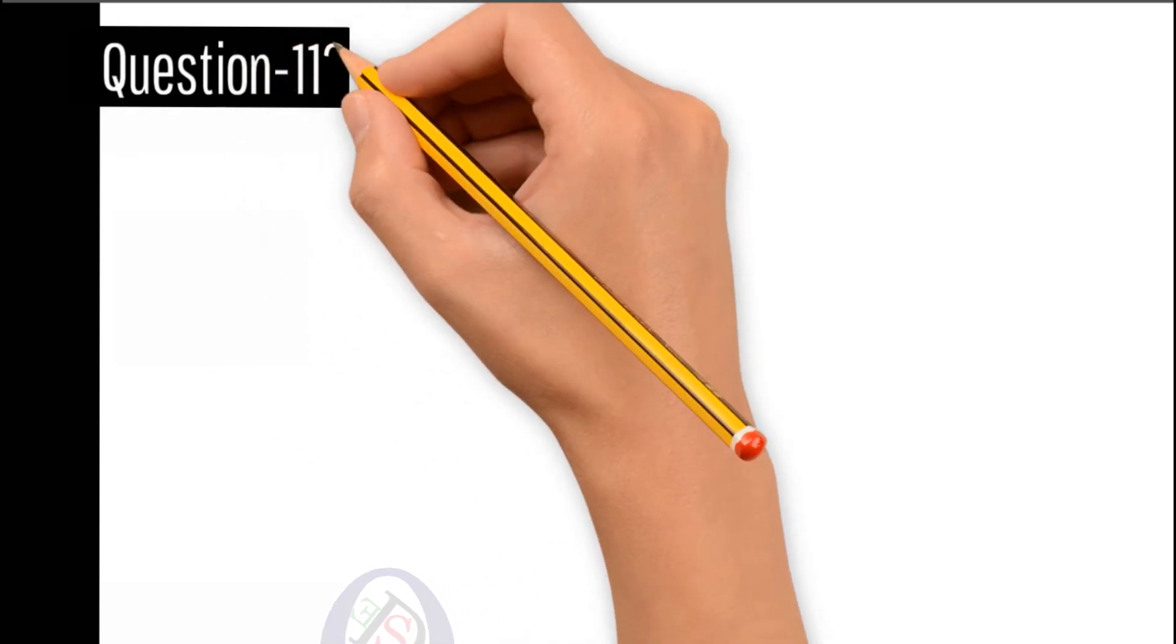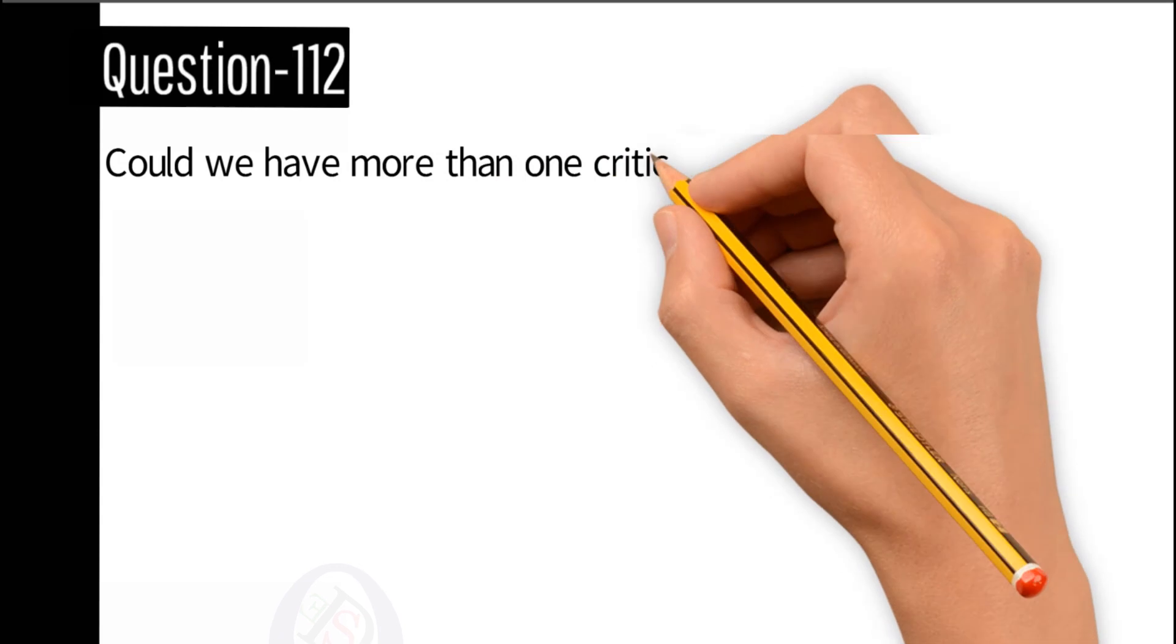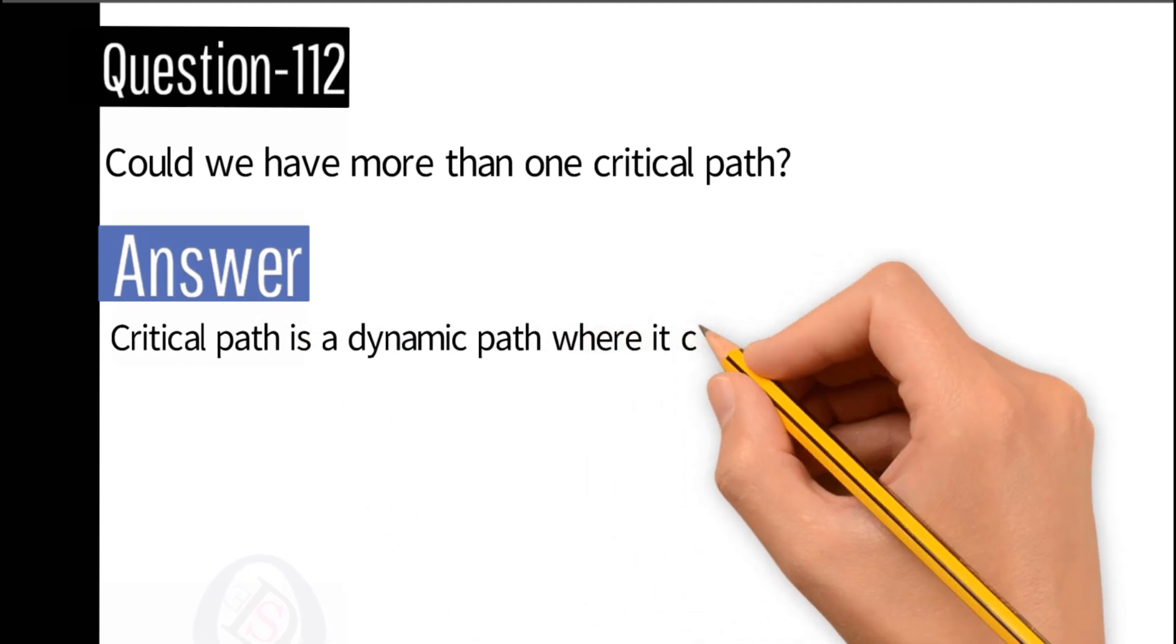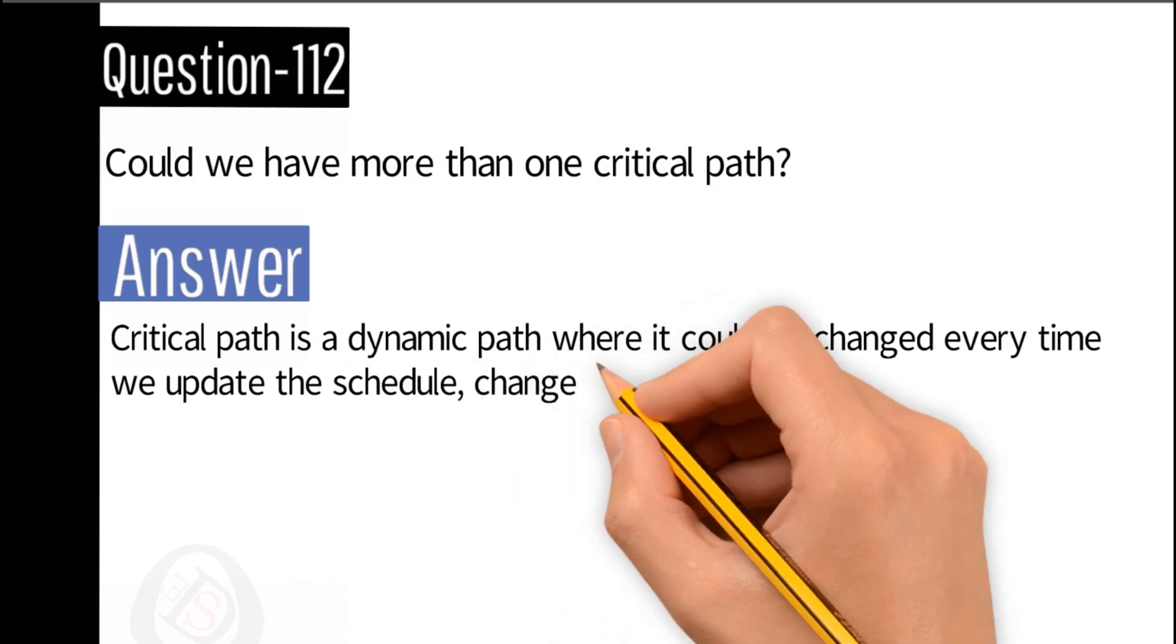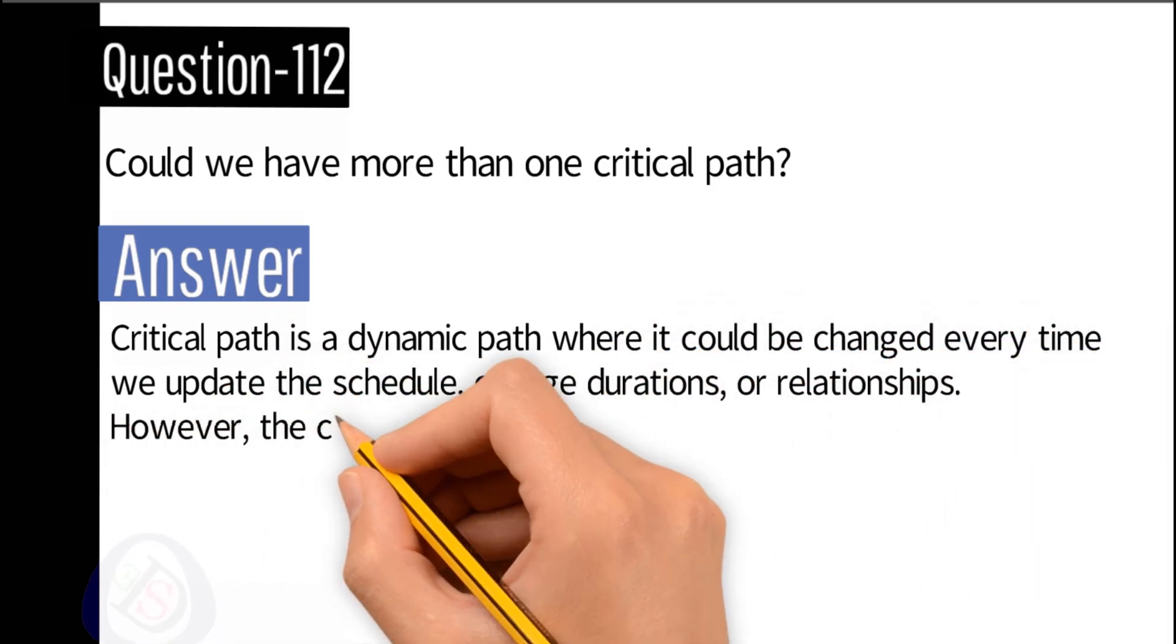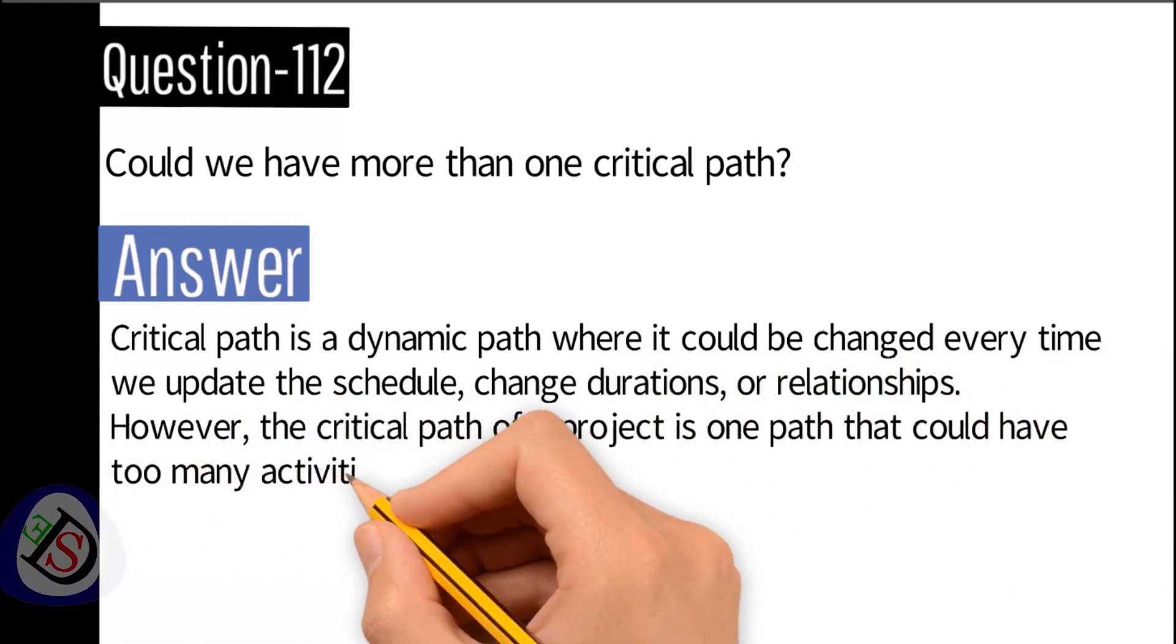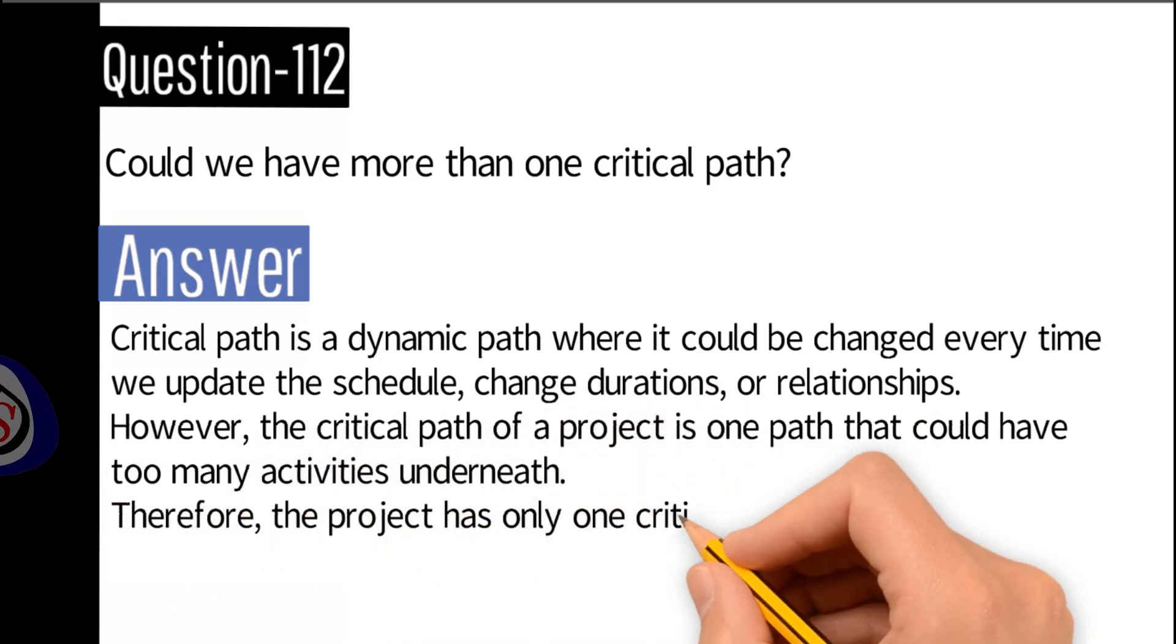Question number 112: Could we have more than one critical path? Answer: Critical path is a dynamic path. It could be changed every time we update the schedule, change durations, or relationships. However, the critical path of a project is one path that could have too many activities underneath. Therefore, the project has only one critical path.